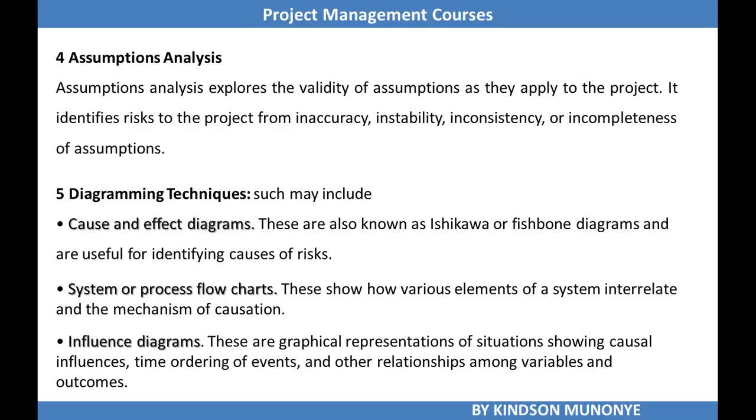Alright. Another tool and technique is assumption analysis. This takes all the assumptions, looks at their validity as it applies to the project, and identifies risks to the project from inaccuracy, instability, inconsistency, or incompleteness of these assumptions. So assumption analysis prevents you from just saying this assumption is correct. It helps you to keep clear in your mind that these are just assumptions. They might be correct, they might not be correct. So keeping that clear in mind might help you to identify impending risks.